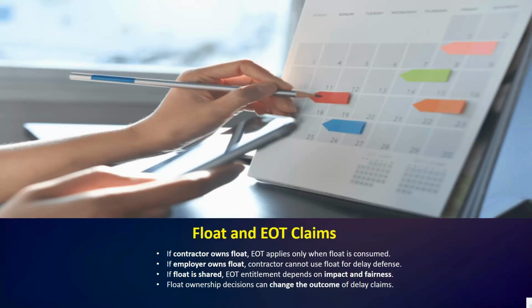Next we have float and EOT claims. Float ownership directly affects the outcome of EOT claims. First, if the contractor owns the float, EOT applies only when float is consumed.